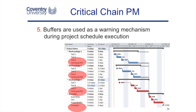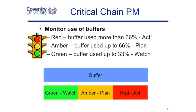The fifth concept of critical chain is to use feeding buffers. I've highlighted the feeding buffers inserted into this Microsoft Project plan. The way you use these buffers is: if you start to use up to 33% of the feeding buffer, you report that as green and just monitor the situation. As you approach 66% of your buffer, you plan to take some corrective action. Once you've used more than 66% of the buffer, you take action — you're in the red zone. So we report on the consumption of the buffers, tying back to the first concept that we're not going to report dates or durations but rather how much of the feeding buffer we've used.